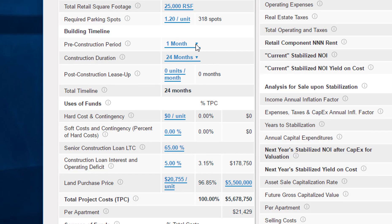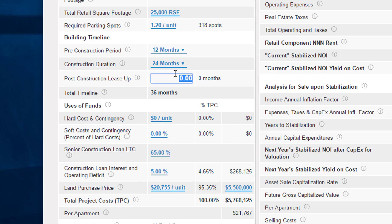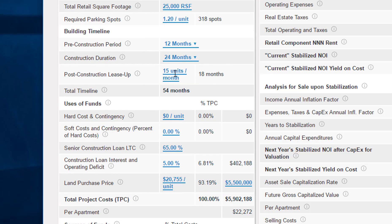For the pre-construction period I'll put in 12 months, meaning it'll take a year to get to building permits. The construction duration I'll leave at 24 months, and I'll assume we can lease up after construction at 15 units a month — an 18-month post-construction lease-up period — for a total timeline of 54 months.